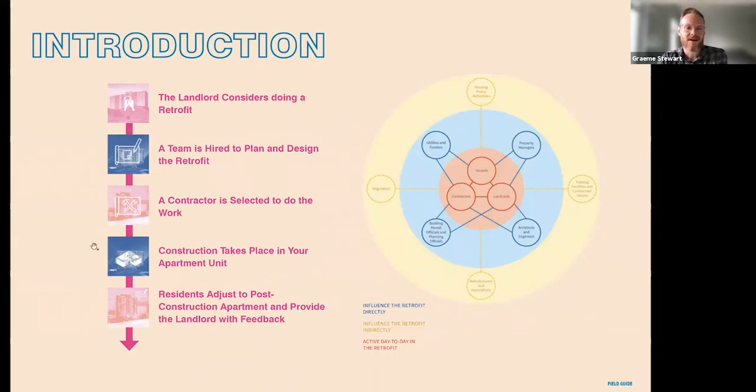Customer care in terms of how you can design and schedule the projects such that you're entering suites as limited a number of times as possible. We've been involved in some retrofits by contractors who will remain unnamed, where typical means and methods meant people were entering suites over 30 times to do a relatively modest project.